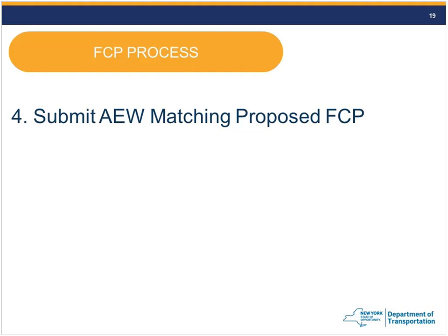Depending on your scenario, if you have field change payment money, maybe you break it up into 2 orders, but it is possible to do it in one order, bump it up to the 125, 200%, 5K rule, and then you renegotiate. The adding of that new item can all be done on the same order if it's a conventional order. The new item rules.